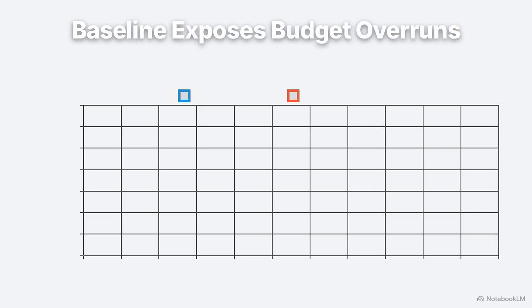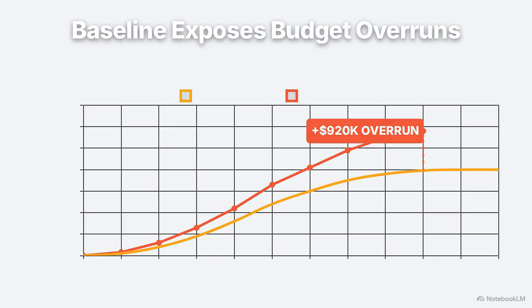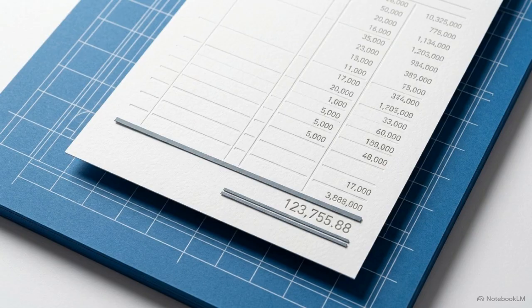Saving a baseline permanently locks the initial optimized cash flow model to serve as the comparative standard for the remainder of the project. Without a locked baseline, future schedule slips or budget overruns cannot be mathematically audited against the team's original expectations. The complete process requires discipline.